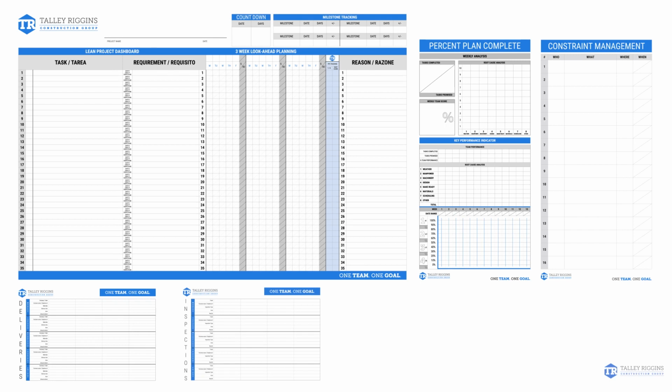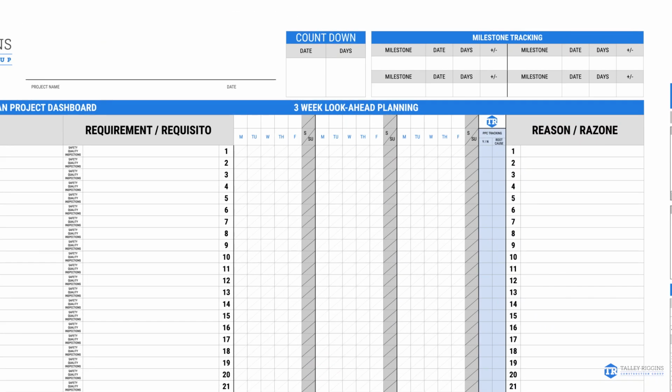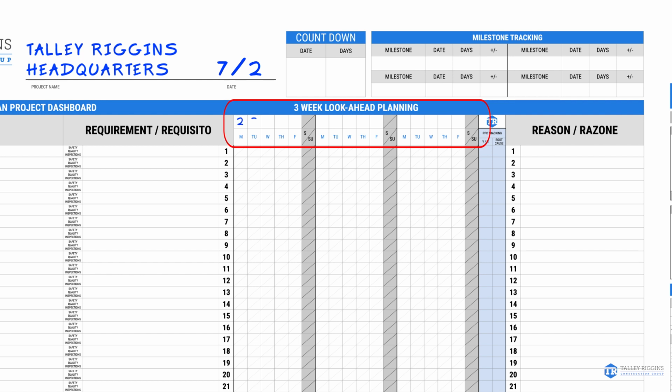In this video, we will discuss how to fill out your project dashboard header and incorporate milestones. Let's start by filling out your project name and the current week's date. For example, we will fill in the Talley Riggins headquarters for the project name and July 2nd as the current date. After filling in this date, you will need to insert the dates of the following weeks, starting with Monday on the board under the 3-week look-ahead planning section.